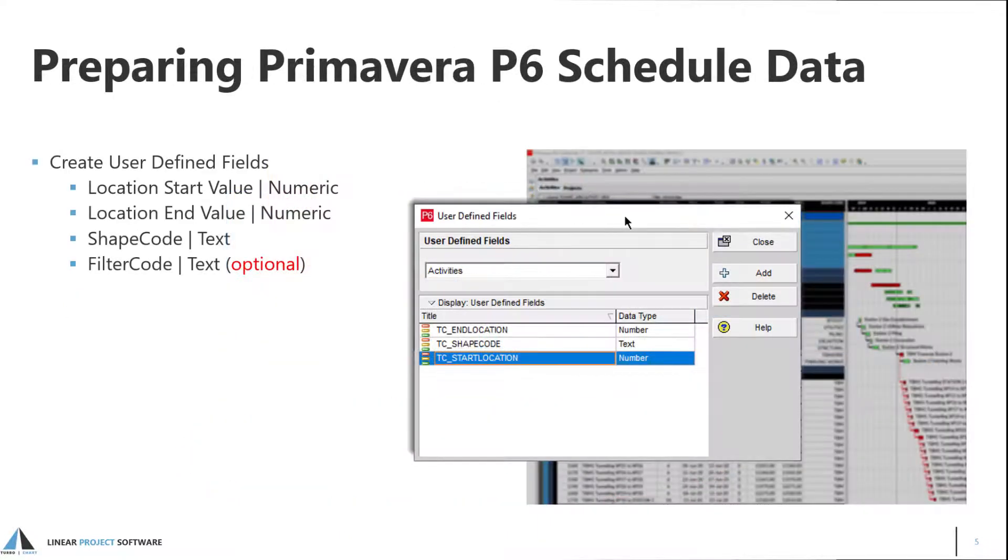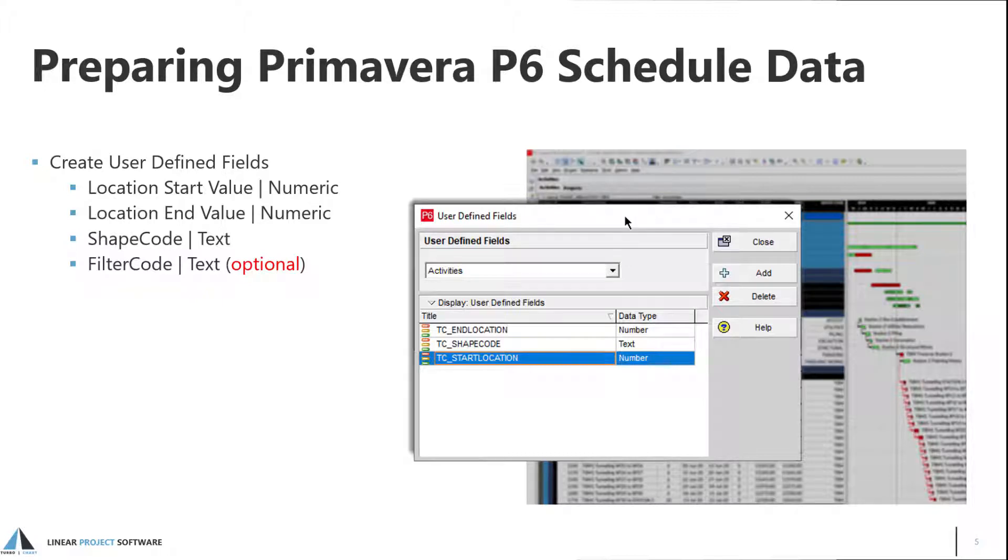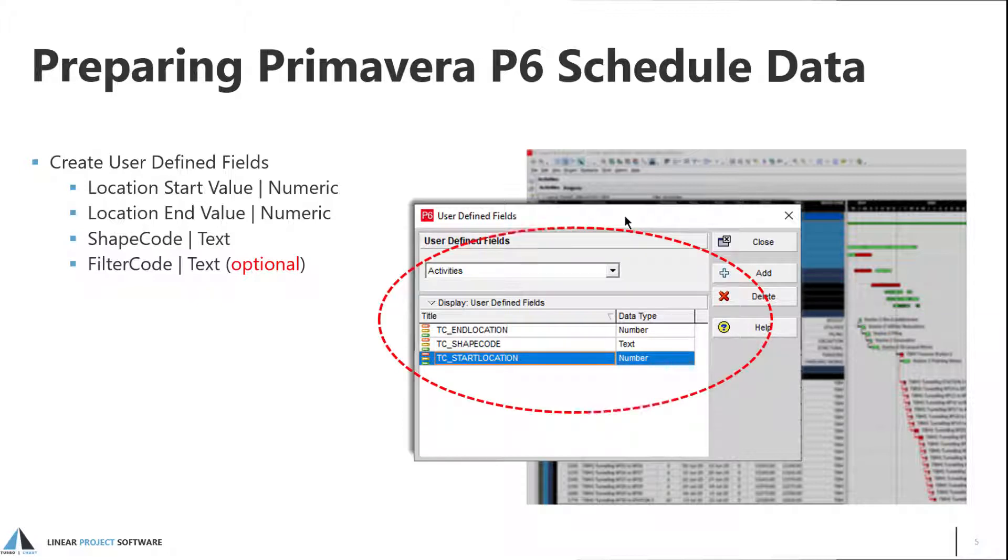For any method of importing data from P6, the preparation of the data is the same. Activities in P6 are assigned additional data using user-defined fields. These user-defined fields can then be used for any project within the P6 database. Numeric fields are used to define the linear start and end location values for activities. A shapecode is a text value used in TurboChart to define how the activity is displayed, such as colors and shapes. An optional text field is the filter code that can also be used for additional filtering purposes.